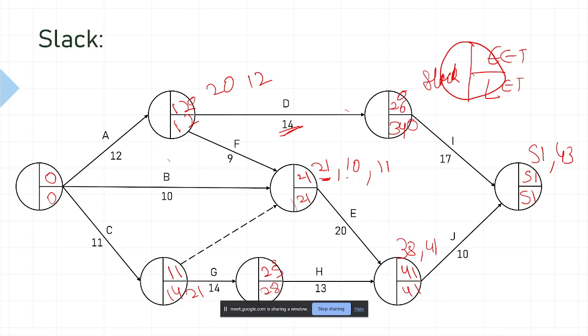Every day of delay costs money, right? Resources and money, and you have to know which event you can afford that extra flexibility in, otherwise you have some leeway there, right? Won't it help to plan the project better? Suppose an activity with Slack is delayed by 1 day, and its Slack is 2. You know that you can still complete it as long as you keep the rest of the activities on time.